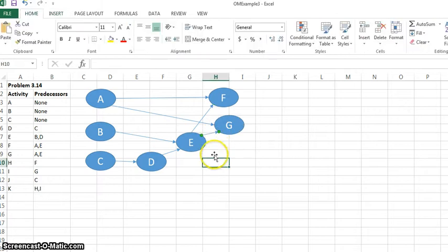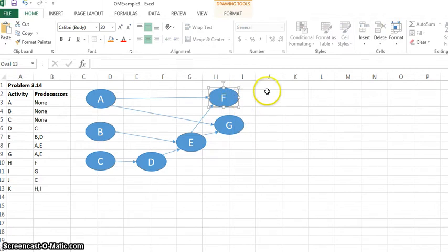What we see here is that an activity like A or E, we would say, is an activity with multiple successors. In this case, two successors, because two activities come directly after E. Now we'll finish the diagram off. Activity F has one successor, that's H.